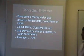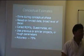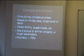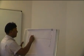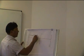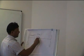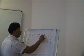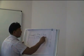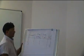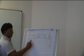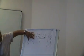A conceptual estimate. What is a conceptual estimate? A conceptual estimate is done during the conceptual phase of a project. If I can just quickly draw it to you, you can clearly see in your project life cycle. Here you have your concept phase, here you have your plan and design phase, here you have your execution or implementation as we call it, and here you have your closure phase. The conceptual estimate is done there, during that phase of the life cycle.